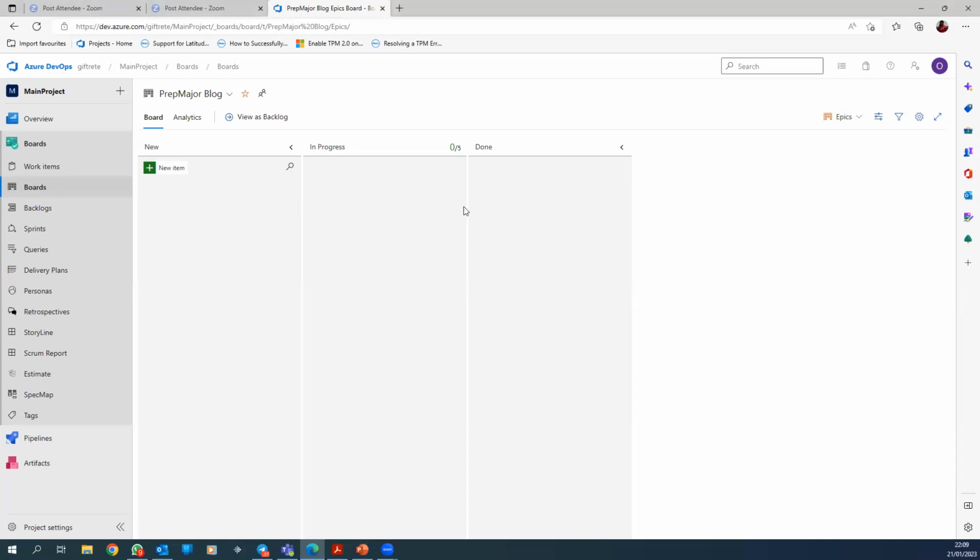Now, the epic we said was landing page. Underneath that epic we had features: the header menu, main body, and footer menu. And underneath the header menu feature, we had the logo, home button, ability to register, ability to log in, and all that. If we remember, I did share that with us.